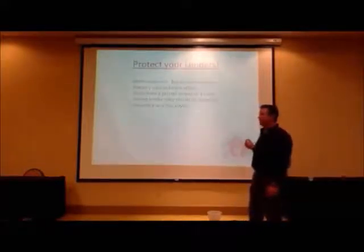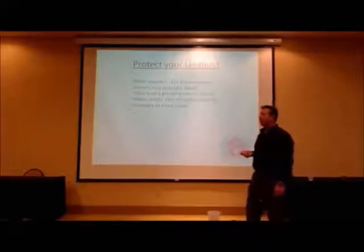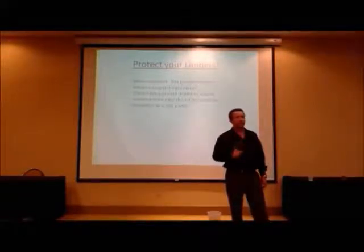Protect your lenders. Banks are going to require it. Hard money lenders typically are going to require it. Private lenders typically will forget about this. So you're going to impress them if you tell them, we're going to cover you. We're going to put you on the insurance policy as an additional insured.